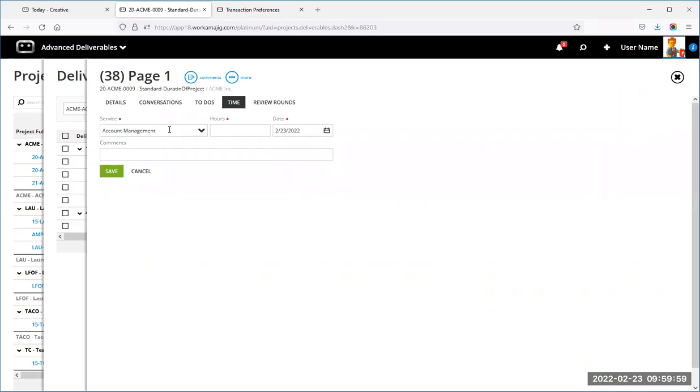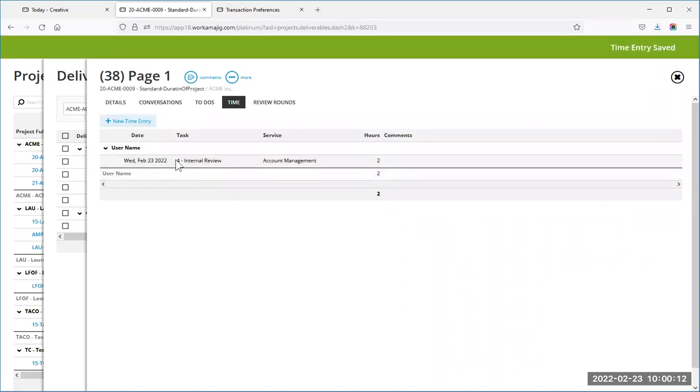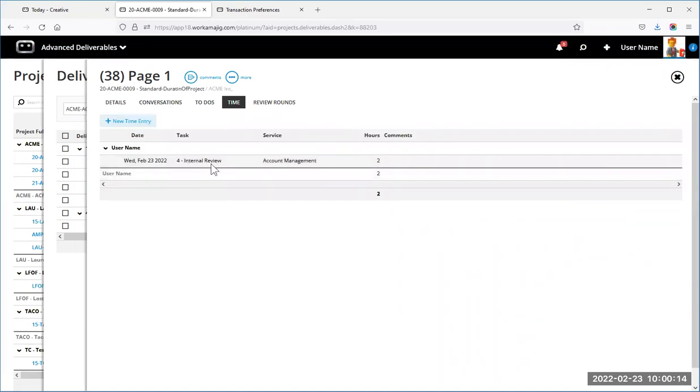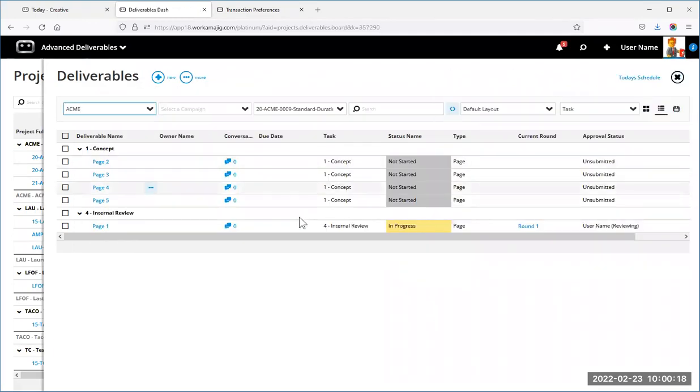So this is where we're breaking the mold a little bit and saying instead of living in the Today creatives, we can go and live in the, not to-do board, the deliverable board, and say, okay, I'm going to spend about 2 hours on this, and I'll save that. And of course, it's going to tag it to the task. Again, do I need to know about that? Not really. So if you're managing the deliverables at this level, we're either utilizing the task as our status, or we're just using the status as the status. Again, depending on how you integrate your workflows there.